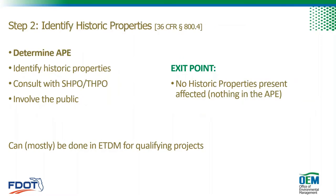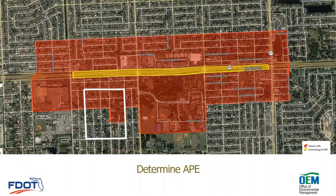In Step 2 we determine the APE, or Area of Potential Effect, conduct background review and field survey to identify cultural resources, and then evaluate those resources for significance. We will consult with DHR and involve the public. Most of this can also be done in ETDM for certain minor types of projects, but most projects will still require a field survey completed in PD&E.